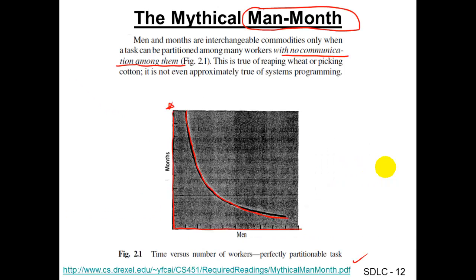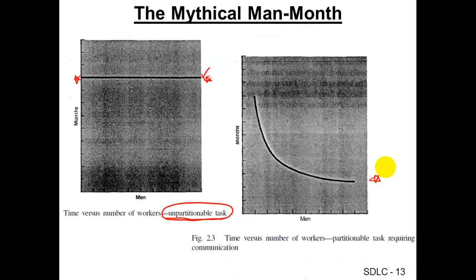Getting more people doesn't help at all in that situation. In practice, in a lot of situations, if you compare the ideal diagram and the practical diagram, they look similar but behave differently. The ideal case runs one way, and the gap between ideal and practical means additional overhead when adding more people — more meetings, more coordination, more communication, or people getting in the way of each other.